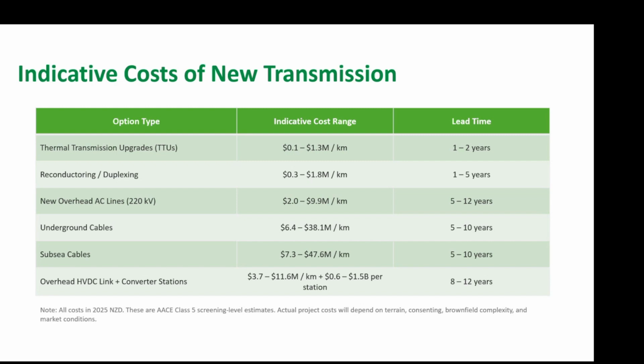People familiar with project life cycles would say this is the really front end, or in AACE terminology, a class 5 estimate, and that can have an accuracy range of -50% to +100%, and that's how we've informed the range of costs from that model.